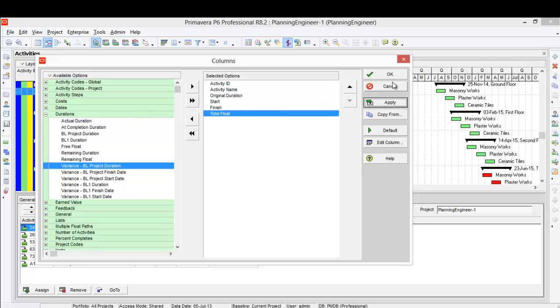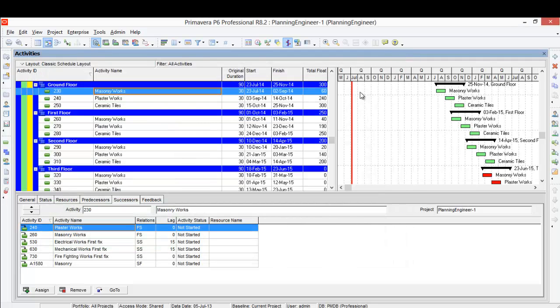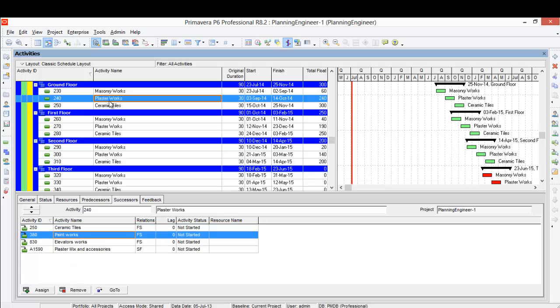After the finish, then I'll click apply. Here is the total float. Let's track the plaster work for example - it has 240 days total float which is something not reasonable. So what is the successor activity? After I finish the plaster I need to start the paint.